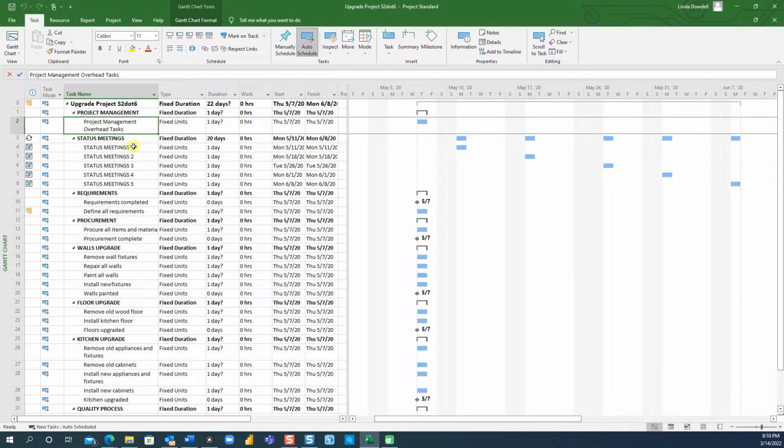Now let's talk about durations in general. Duration defines the start and finish date of tasks. These two columns in here. Regardless of the work effort spent on tasks, duration is represented or viewed as units of time, such as days and weeks. Those are units of time, not the effort that is spent in doing the work. Those are just units of time.